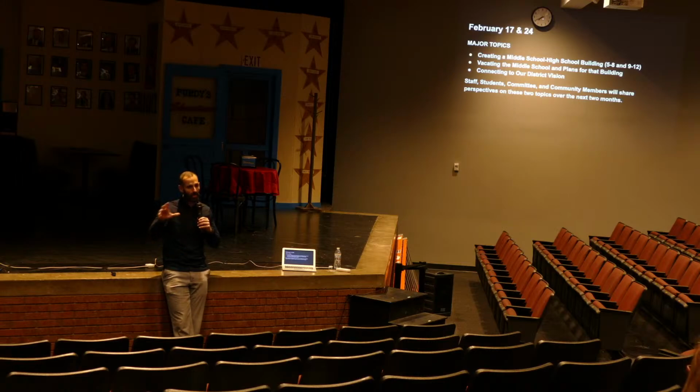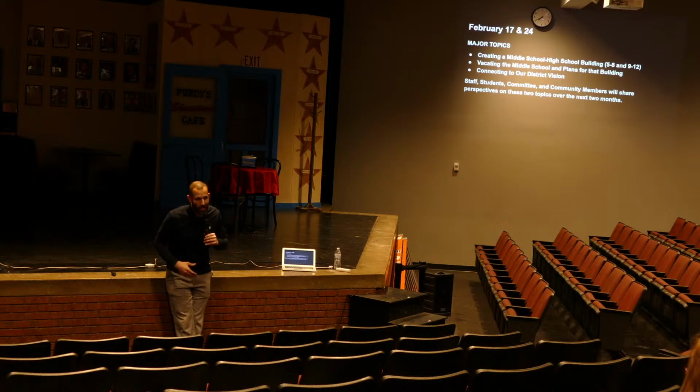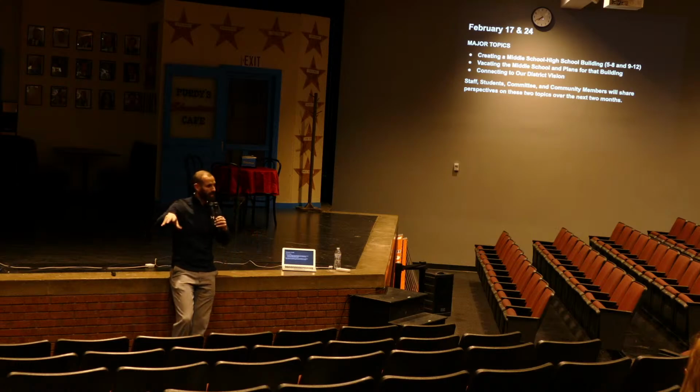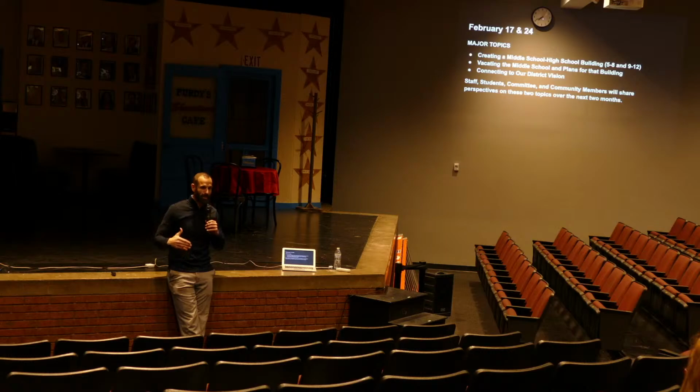And that's the time period that it'll take to construct the new academic areas and ultimately move kids over. Another part of that is the way we've got this design, we would be able to sequence and stage that where we would never have to disrupt having school here at the high school. So we would be able to maintain all kids in this building without having to bring in additional structures to house kids. We'd be able to sequence everything so that school continues on as normal in different spaces and still